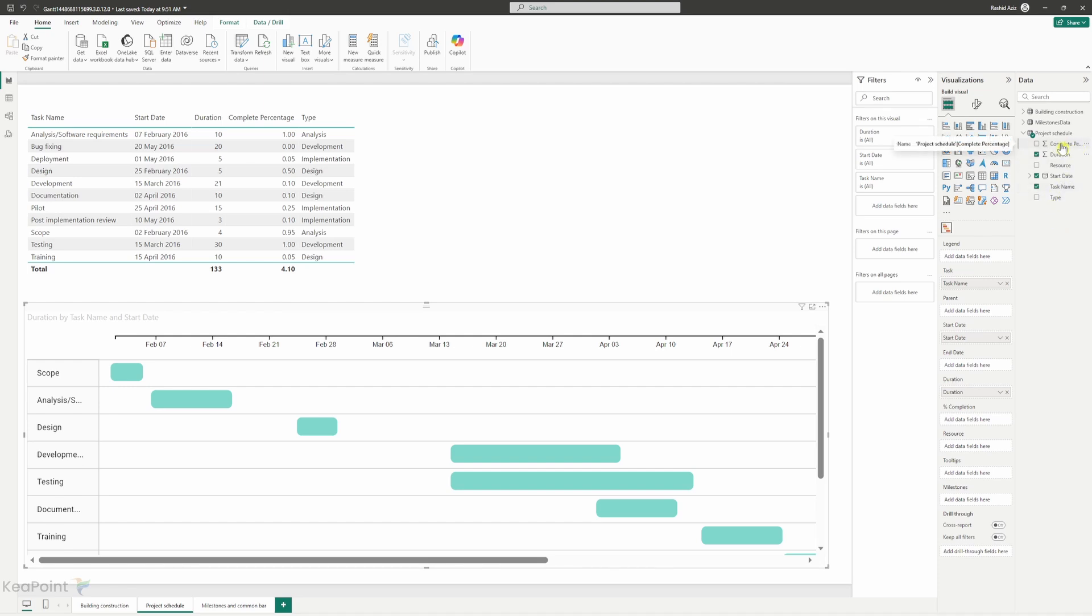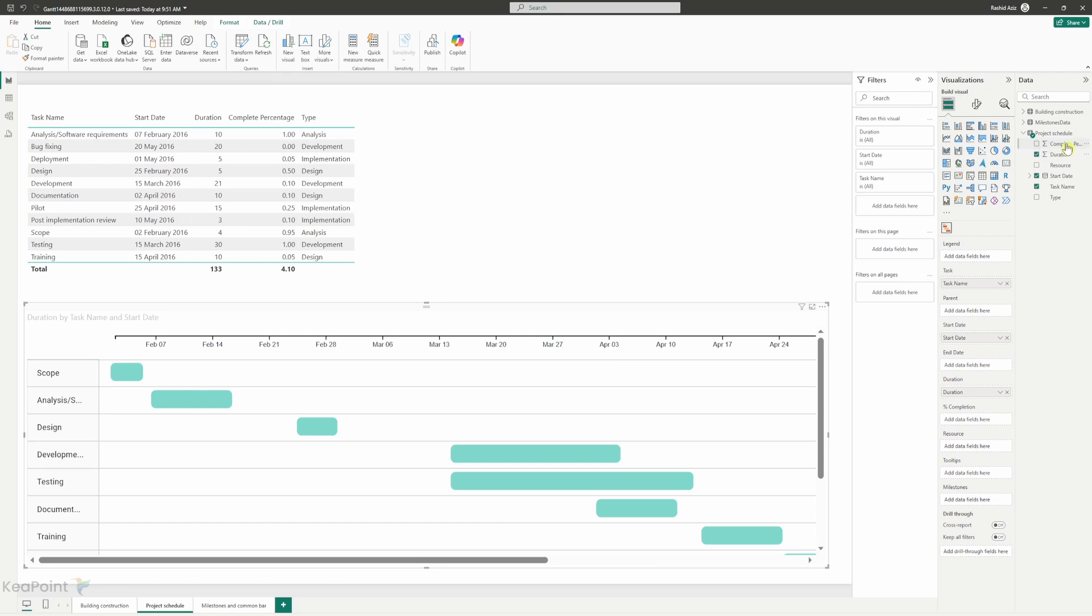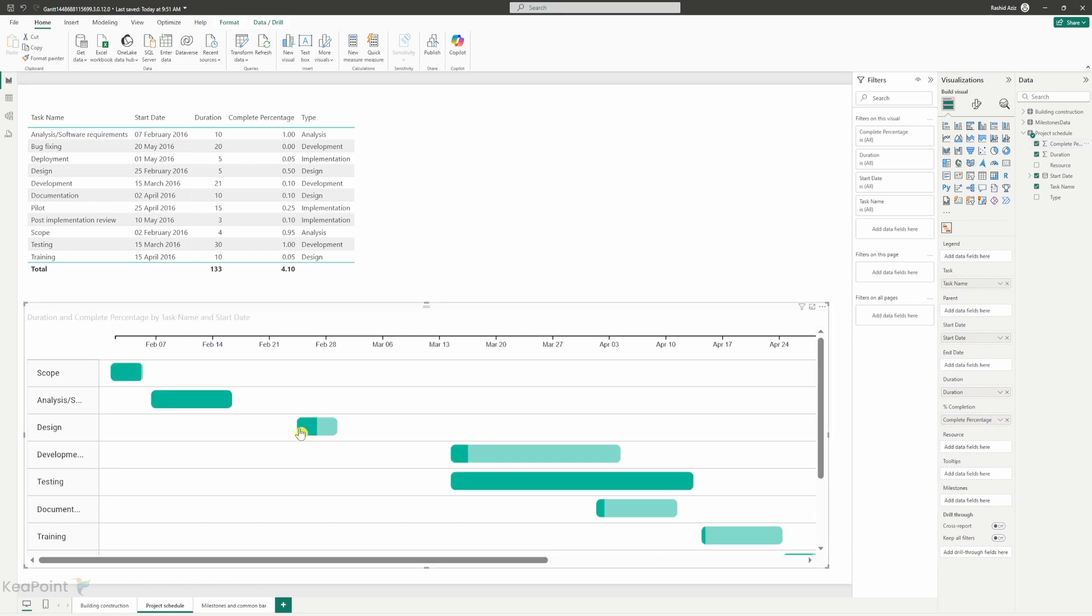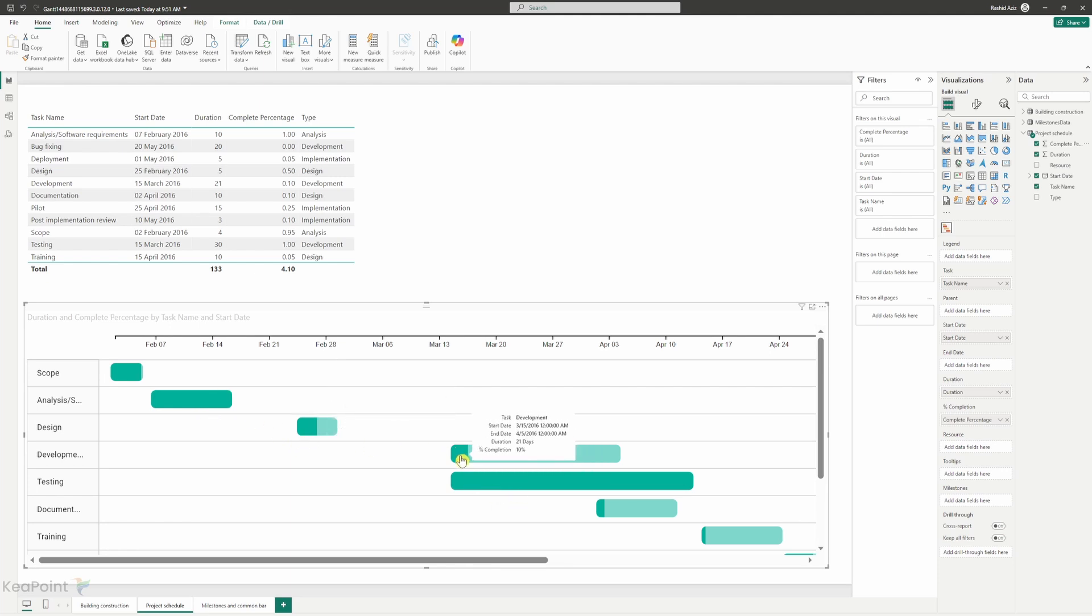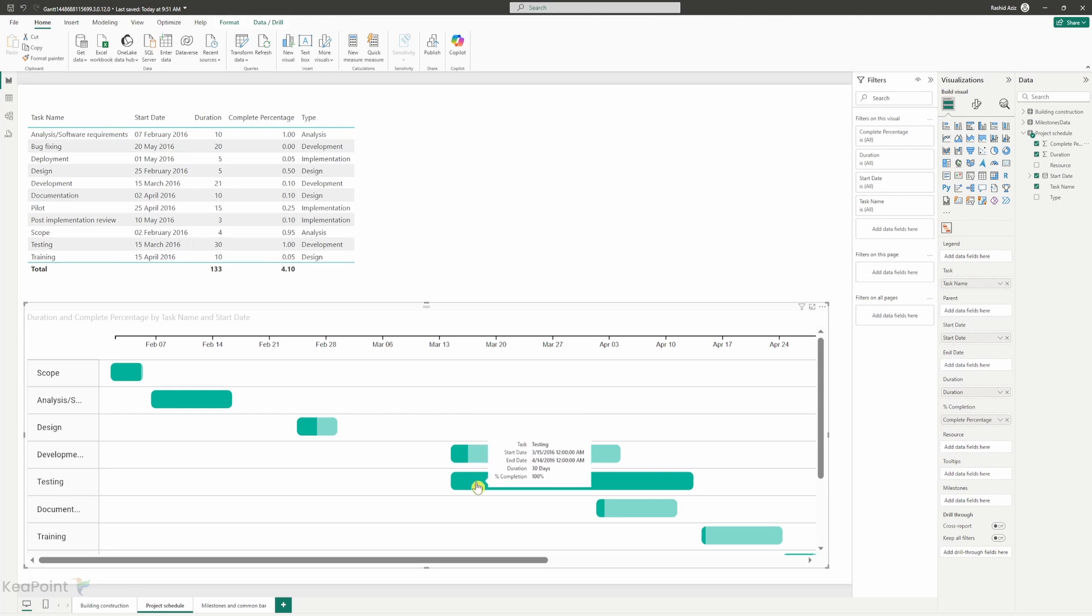Now next we need to add a few more things here. So first we need to add complete percentage. So how much a task is already completed. So for example, if the task is 10 days long and we have completed, let's say 10%, which means one day is completed on that task. So I will select that and drag it under the completion percentage field here. And now we can straight away see a lot of these tasks. Either they are completed or they have like 10% completed. This is like 100% completed. So we can see the duration and we can also see what's the status of each task.